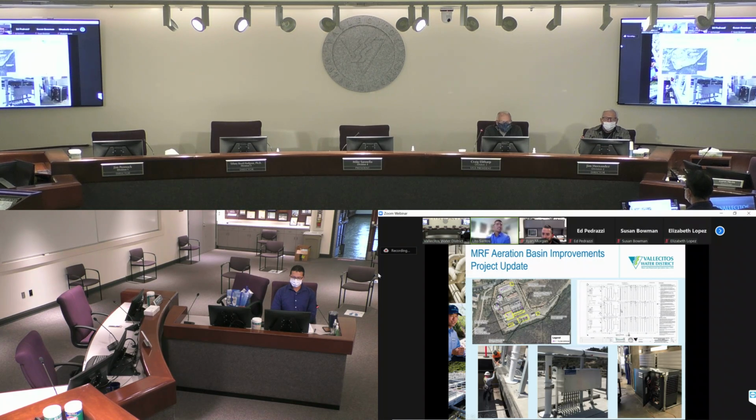We had notice to proceed back in March. This is a design build that's going to take over 10 months with a 3-month procurement. Sometime in August, we found out the supplier was heavily backlogged and they couldn't get the supplies out to us. We're fortunate that we're actually going to get the supplies tomorrow at the treatment plant and continue on our progress. Right now, we have the anaerobic zone